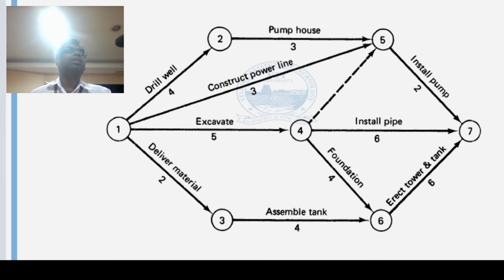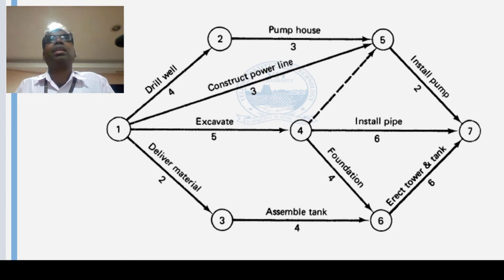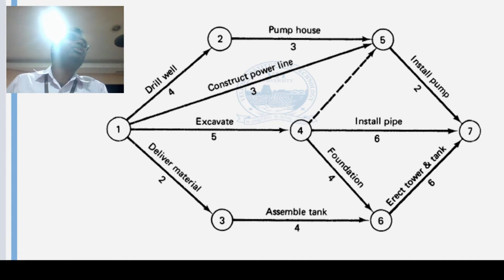Then excavation work, another 3 years. Then mass concreting, or soil stabilization, another 1 year. So like this, the entire project would be in years. So total completion, 10 years, in your L1 schedule will be put in that scale. L2 schedule may be in the order of a few months. So what I am going to do is stabilization, probably by compaction or grout. Whatever you want to do, you can put it in your L2.